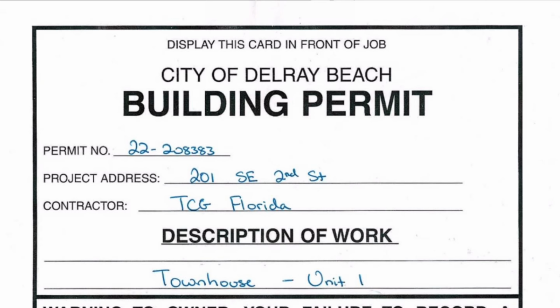The permits were issued on July the 13th, so after 2 years, 1 week, 4 days, 6 hours and 40 minutes, we finally got our permits. Yay! It was exhausting, emotionally draining, somewhat anticlimactic, and downright the most arduous bureaucratic nightmare I have ever endured in all the years I have been involved in developing.